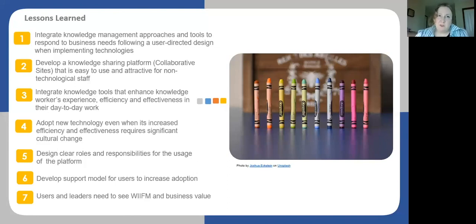A different metric, I think, from a web analytics perspective, would show adoption and engagement. And for time savings, the one that I did was looking at how much time is saved with the new meeting management solution compared to the previous one.